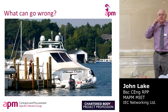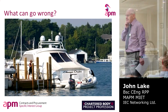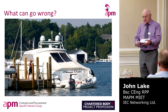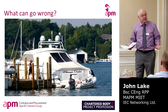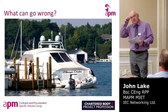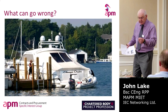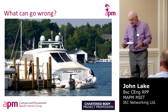How many people have come across the idea of upselling from contractors? Upselling's okay, but if it's upselling what's already contracted, what you think they're contracted to do, it's not so good. I've come across that a few times, where going through the contract a change order suddenly comes to you because you wanted to change what we thought was quite a minor thing, and what's happened is they've put every bit of the cost that they've overrun into that change order. This happened to me, and I'm not going to say what company it was, but it was an American company. At the end of the project, we had a get-together and started talking about it, and they said, oh yeah, that's our strategy, we always do the upselling, we go in low and then we try and upsell it. So sometimes it can actually be the strategy.